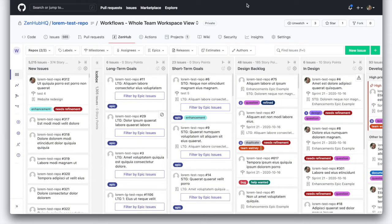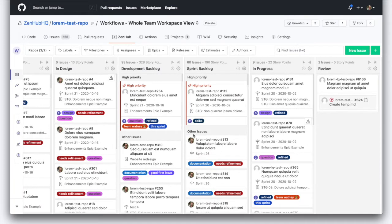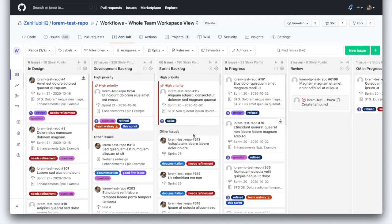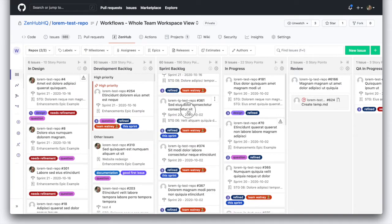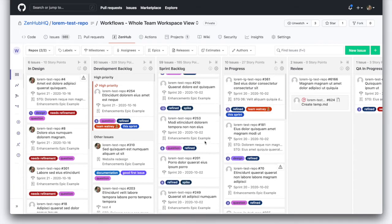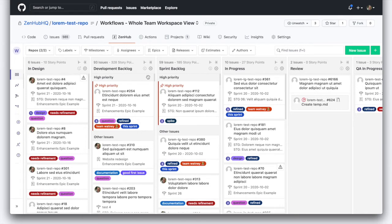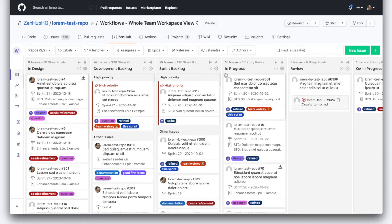Let's look at Zenhub. At first glance, this may look a lot like the project board we just looked at in GitHub. There are similarities — you can set up these columns to be whatever you want, this one has a few more columns. You can drag and drop issues to move them around. If I want to make something in progress, just drag and drop. Here's something new: this is a high priority issue. If something is of the highest priority and you don't want anything to be moved above it, you can click on the triple dot menu and pin it as high priority.